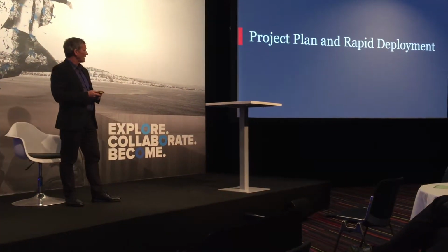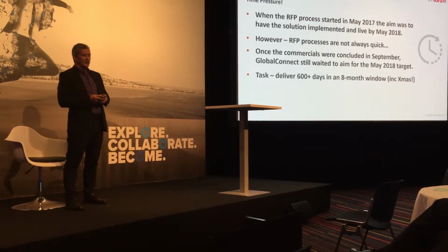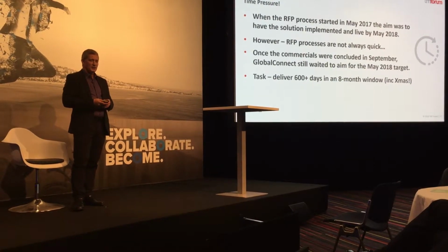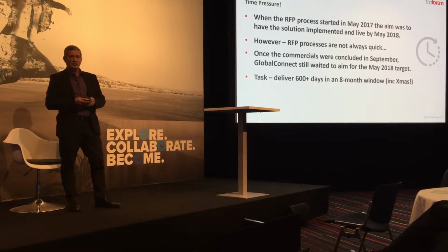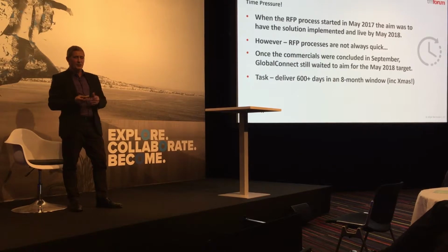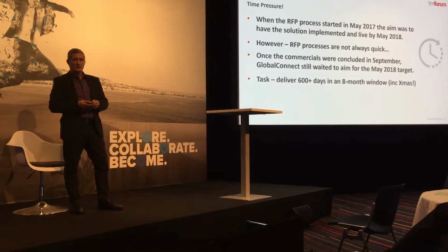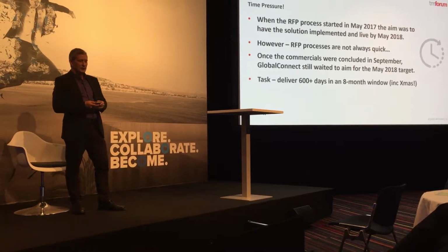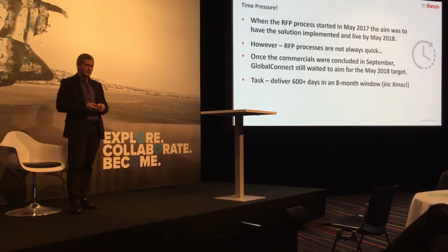Now we'll have a look at the project plan. So, time pressure. All projects face this. We started the RFP process back in May of last year, and the objective was to have the solution implemented and live by May of this year. However, RFP processes and commercials are always slow, but of course the end target rarely changes. So the task of the project was to deliver a 600-day project in an 8-month window, including a break for Christmas.